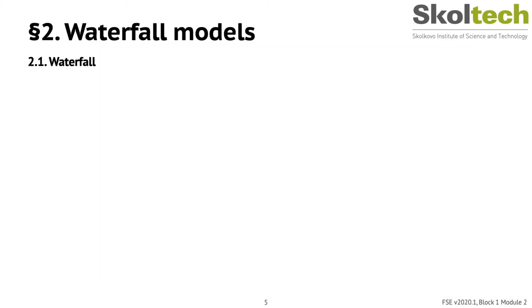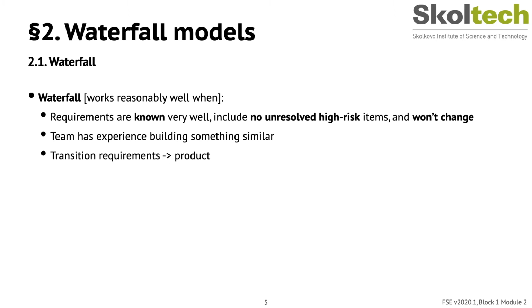Of course, waterfall models work reasonably well when the requirements are precisely known in advance, and also they include no unresolved high-risk items and won't change much during development. The team has previous experience with building some similar project, so they know what's involved in building the application.